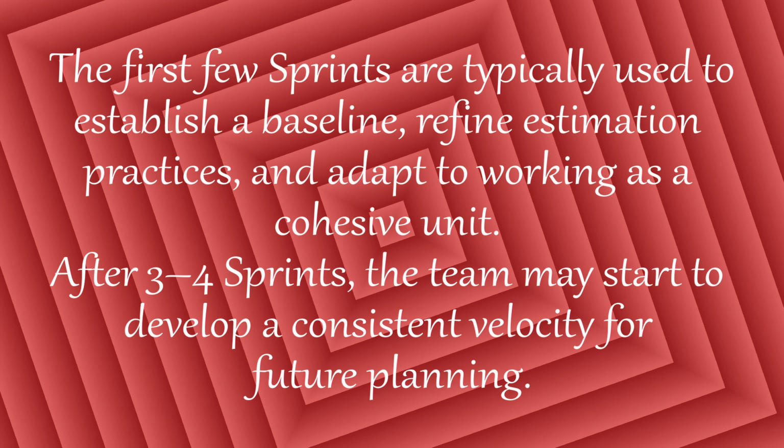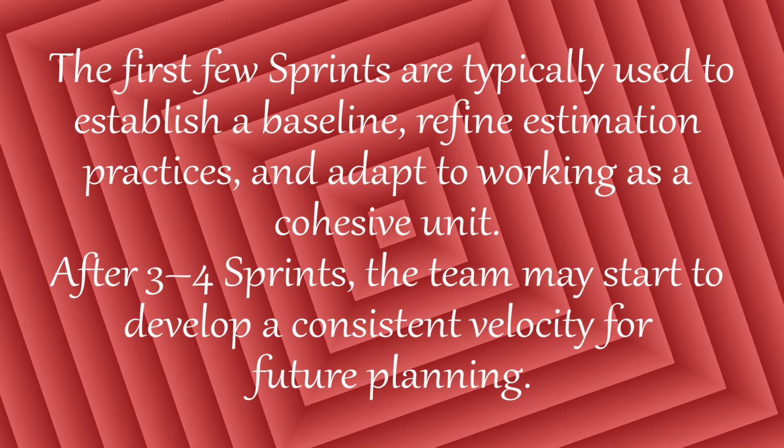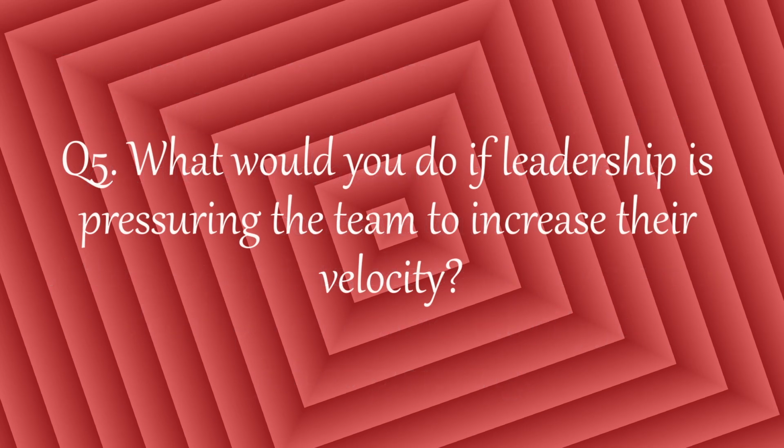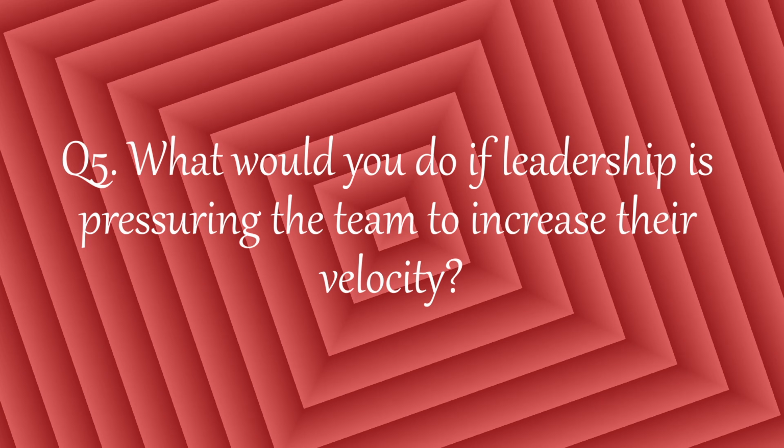The first few sprints are typically used to establish a baseline, refine estimation practices, and adapt to working as a cohesive unit. After 3 to 4 sprints, the team may start to develop a consistent velocity for future planning. Q5. What would you do if leadership is pressuring the team to increase their velocity?